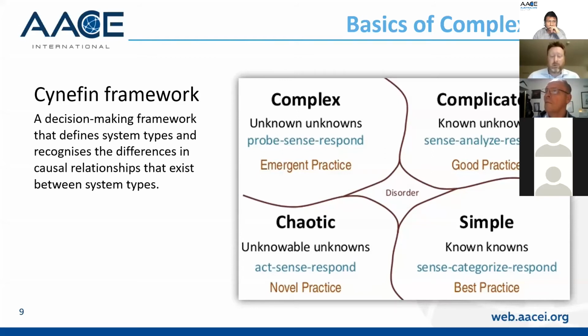So one aspect I like about this framework is that it helps highlight biases that one might have from stepping from one of those environments to another. For example, somebody who's been working in a complicated environment, such as a bureaucratic public company, will tend to see problems as a failure to provide experts with the time and information needed for analysis. So compare that to a complex environment. Somebody stepping into that environment that has a continually changing environment, that same behavior would create analysis paralysis.